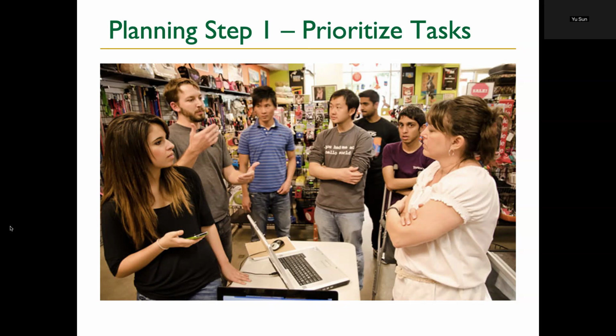All right. Now you've got a long list with priorities. You already ordered and sorted them, right? But the next thing to do is decide what we're going to finish this week. Right now we have 20 tasks, ordered by priority, so we know what to work on first. But how do we make a plan? Should we work on 3 or 5 or 6? Or I have 10 weeks left and 20 issues or features, so every week I do 2 on average. Obviously, that's not reasonable, because it depends on how hard that issue or task is.